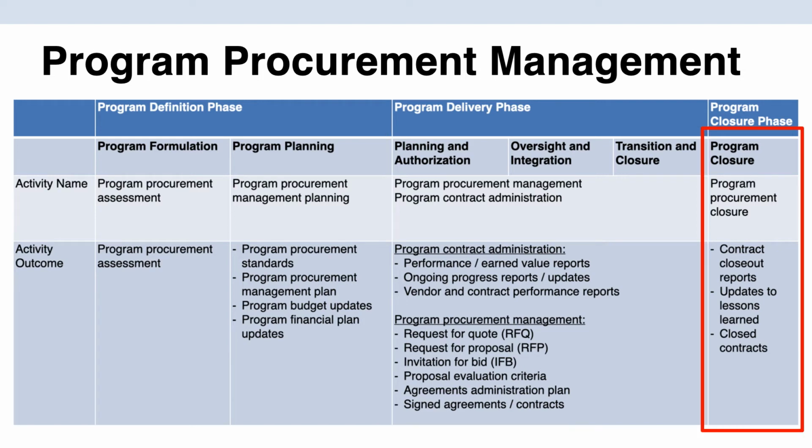And once all of the work is done, then we close out the contract, we give them a final report, we document any lessons learned, and we give notification to the vendor that this contract has ended.